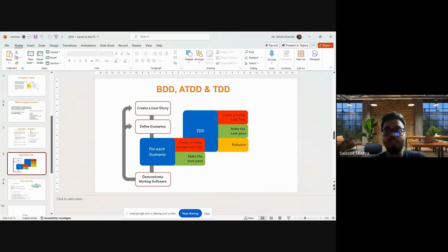So with that approach, whether they find a new scenario or we find a new scenario, we can always go back and tell them, see, we are doing this as an iteration, so whatever you were suggesting comes next. That does give us a benefit that we restrict our requirement intake to an extent, so we do not go for ever-changing requirements.